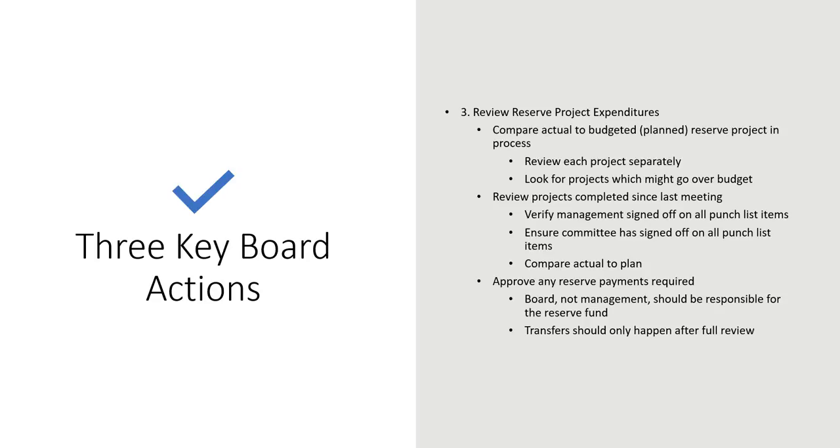This one can get out of control really quickly, and it's often a great big pool of money that you're spending, and it's a tempting target for people to want to pad their expenses. Management should be looking at it. You may have even hired a construction manager to oversee this, but still review the year-to-date actuals on that project to what was planned. It's a good oversight step.